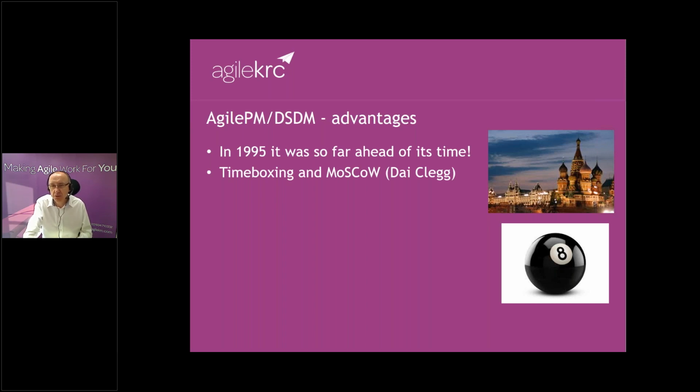Just a quick piece of advice on MoSCoW: it's for projects. You can't really use it in the Scrum area where you just do the most important thing first. But MoSCoW's very, very good when you have dependencies, functional groups. It's easy to learn within minutes, but it does take quite a while to master. There's always, everything's a must, or let's do all the musts first, but that's never the case. MoSCoW, incredibly powerful tool, and well done, Clegg, for inventing it.